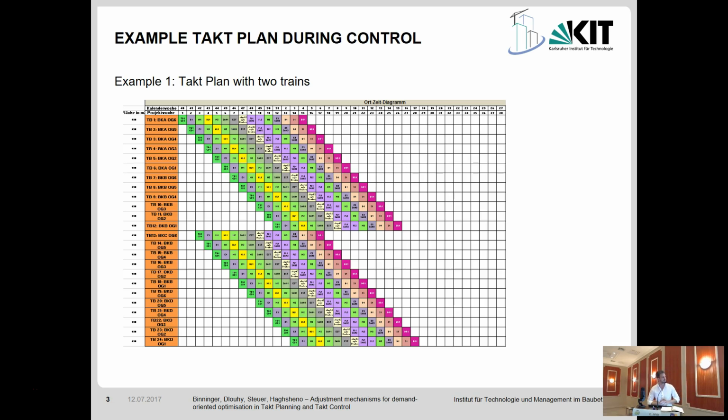So let's jump into the tech plans. This, as you see, and as Clarissa already mentioned in the morning, on the vertical line you see the area, on the horizontal line it's the time, and sorry for that, it's in German because it's just a screenshot out of the tech plans which they use. And within this grid between the lines, we have different boxes, and we try to fill these boxes with different tasks.